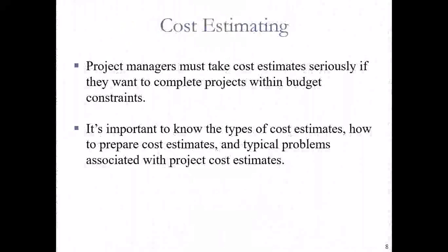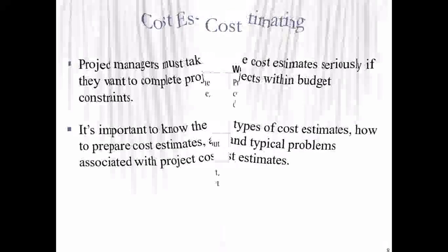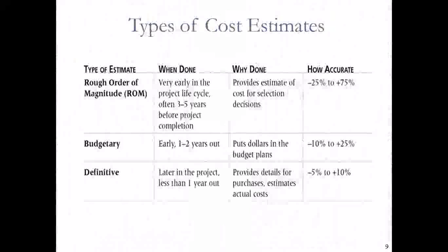Project managers must take cost estimation seriously if they want to complete projects within budget. It is important to know the types of cost estimates, how to prepare cost estimates, and the typical problems associated with project cost estimates. The first type is the rough order of magnitude. This is done very early in the project life cycle — three to five years before project completion.